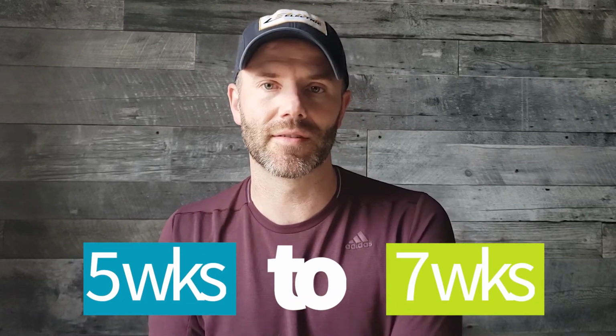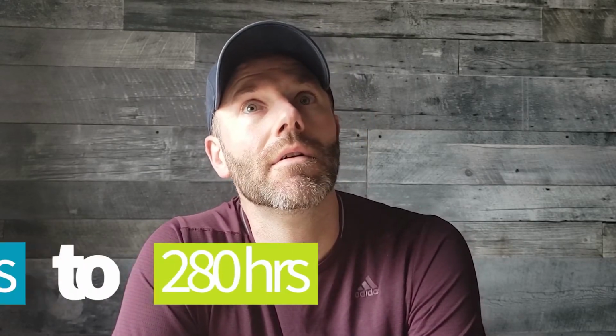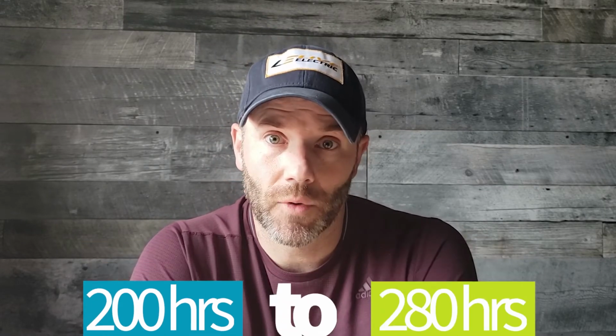So if we go through the days, you're looking at anywhere from 5 to 7 weeks, assuming everything goes perfect and everybody shows up on time. 5 to 7 weeks. So you're looking at 25 days. No, 5 to 7 weeks, 5 days in a week. So you're looking at anywhere from 25 to 35 working days at 8 hours a day. That's a lot of hours, right? So you're not doing that in 2 weeks if you've done this on your own. So have realistic expectations about what you can and can't get done in what timeline. That way you're not beating yourself up when it doesn't go as fast.